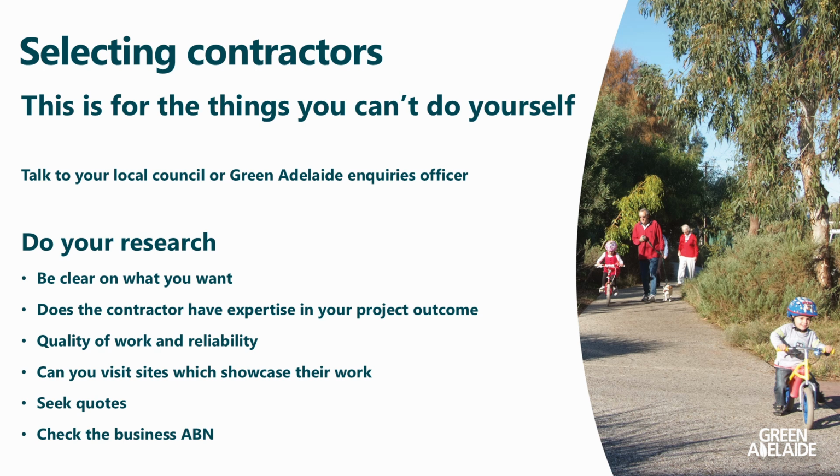And the other point there is about quotes. Now, there's no requirement from Green Adelaide that you have to get multiple quotes, but certainly it can be in your best interest to at least get a couple, just to see whether you're in the ballpark, whether that contractor is not overcharging you. Especially for larger projects, quotes from contractors can vary quite significantly. So you don't necessarily want to go for the cheapest one, but certainly the best value for money, taking into account the other things that we've just mentioned.